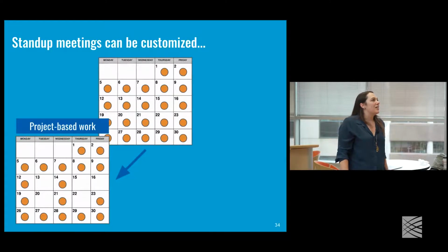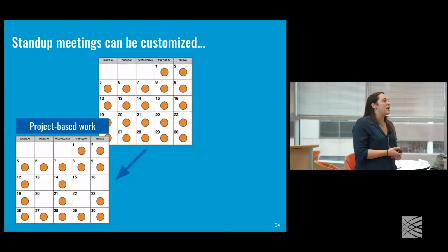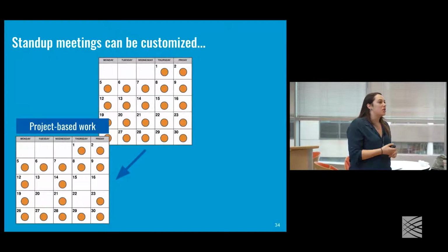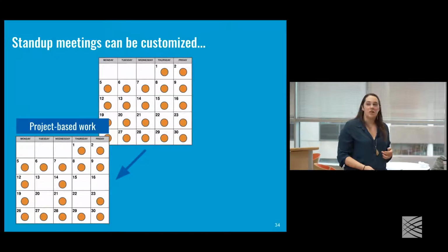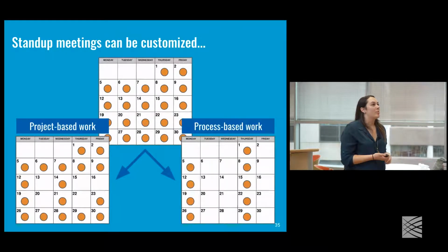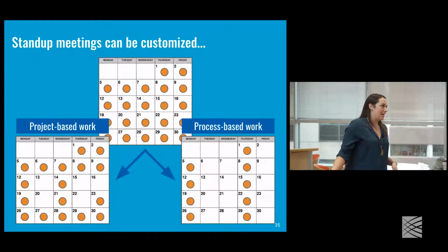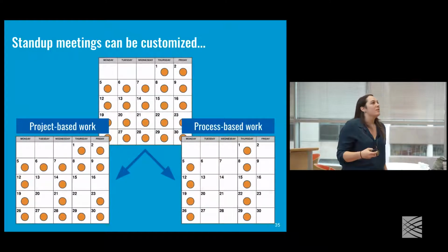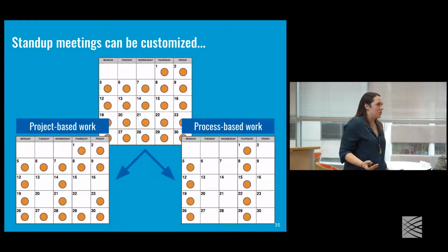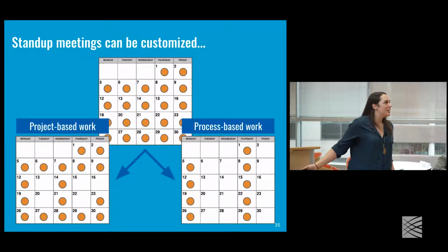And then finally, in the later stage of a project, when, say, you're writing or you're doing a lot more collaboration to wrap things up, perhaps then you do need the more frequent check-ins and you can adjust your cadence accordingly. Alternatively, if you work in a process-based laboratory, often laboratory processes span out over a couple days, and it can be inefficient to meet every day for the daily stand-up because not much has changed.